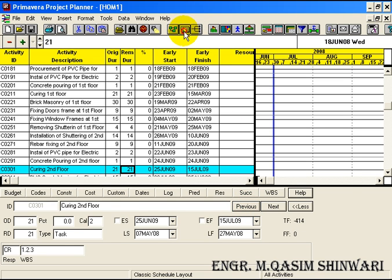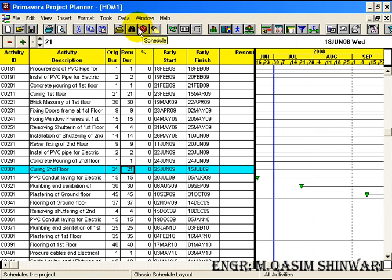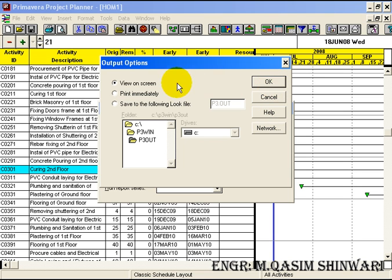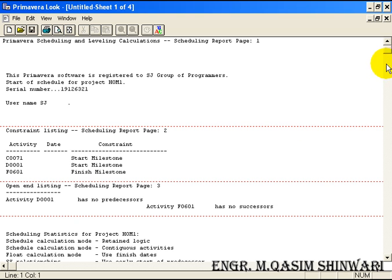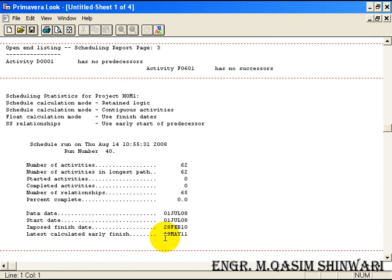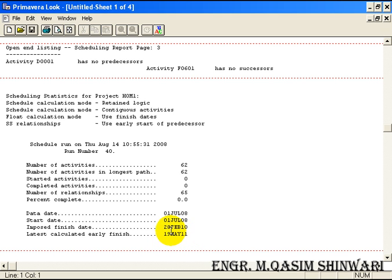Hide the activity form, go to Schedule, and click OK. You can see that our project will end on 19th May 2011. If there is a slight difference in your project ending date and this tutorial's date, don't worry — there might be a difference of one or two months because I have altered this project many times. When you prepare it continuously you will have no problem. Just focus on the concept: we need to bring the project back to 28th February 2010 by starting certain activities simultaneously, which we will cover in coming tutorials.